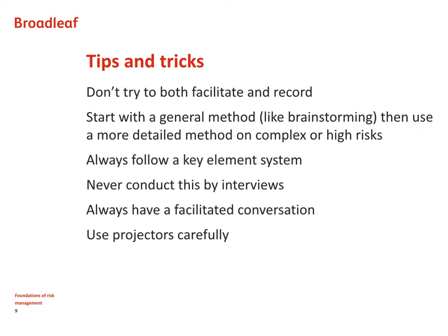The other thing that often happens is if you have somebody who's relatively unskilled typing up the risk register, then we're very nervous typing when other people are watching. It's sometimes better to record the outcomes of the risk assessment workshop on a laptop and then review them after the workshop for coherency, spelling mistakes and so on.